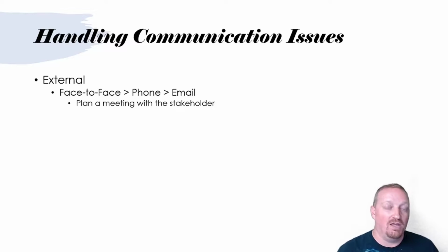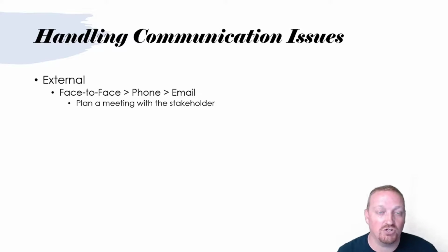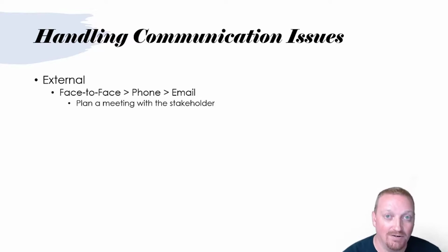Okay, so if I have a story that has 2 dimensions of difficulty on it that I've identified, one of them is communication that needs to be had with the customer, then in that case, I would delay working the story until the next iteration and plan a meeting during this iteration, right?